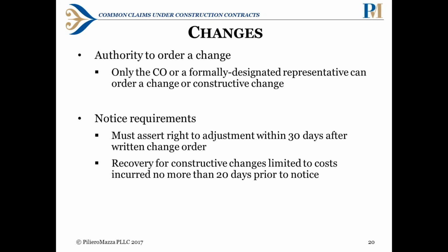And then again, with the notice requirements, you need to assert the right to an adjustment under the changes clause within 30 days after a written change order, or 20 days for a constructive change. And as we've been saying, these aren't necessarily strictly enforced unless the government can show some prejudice.